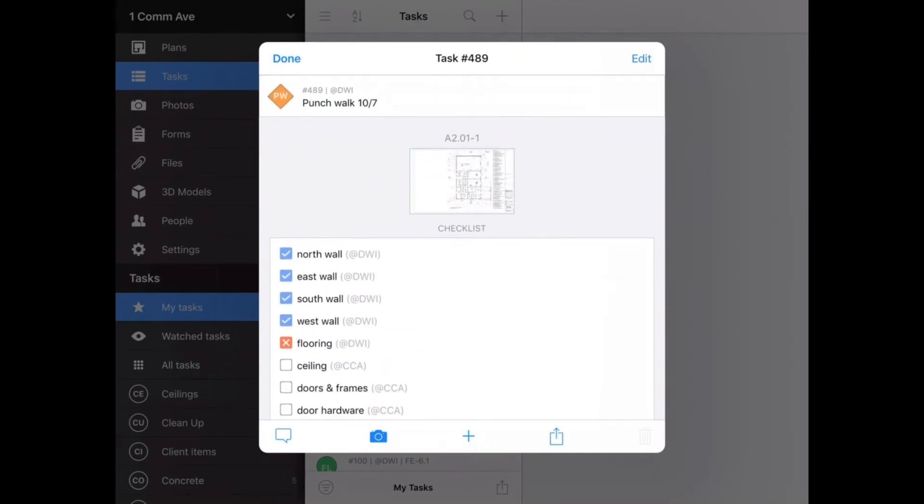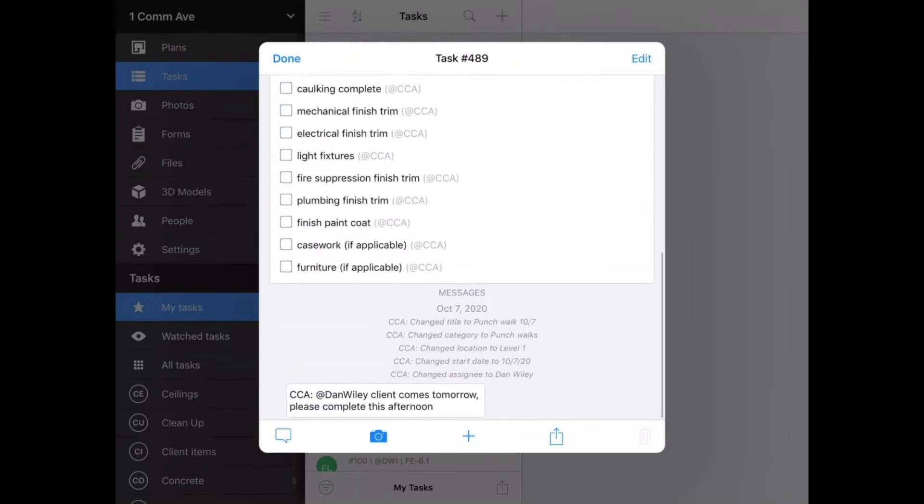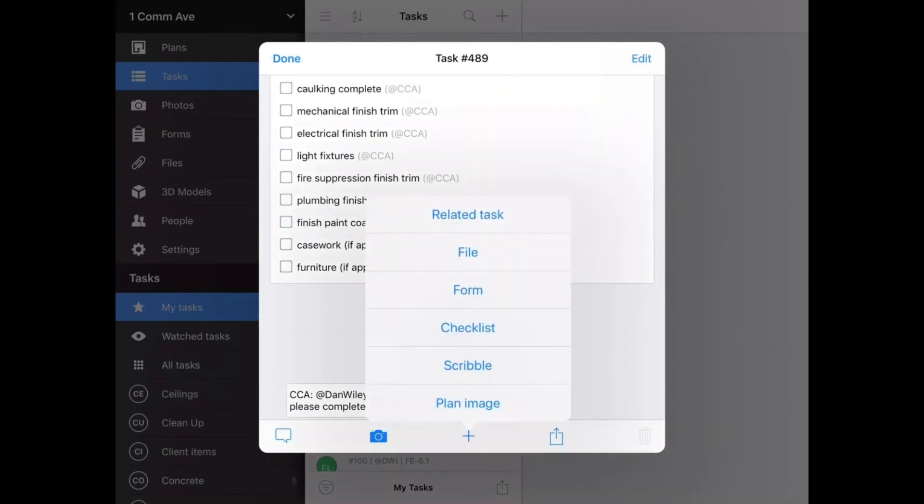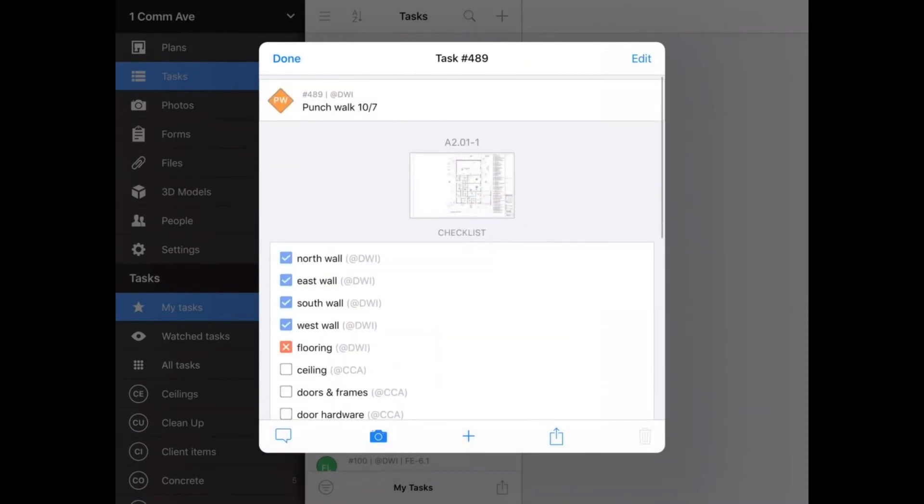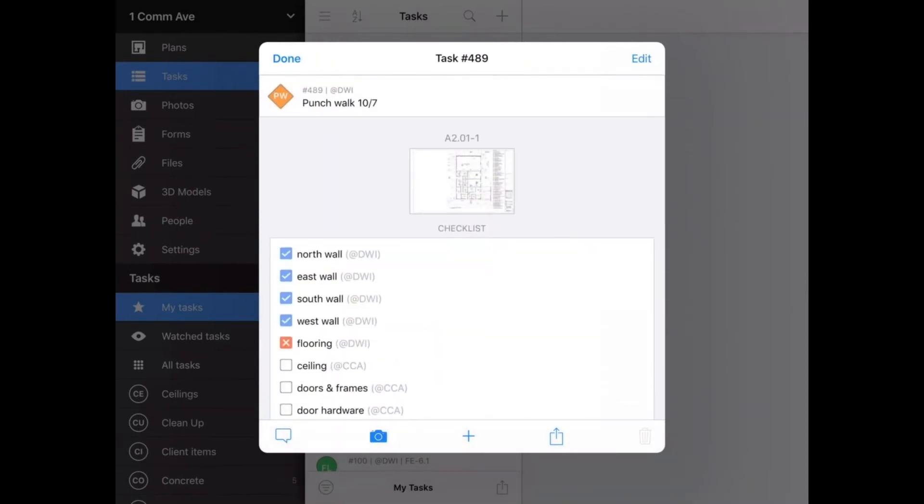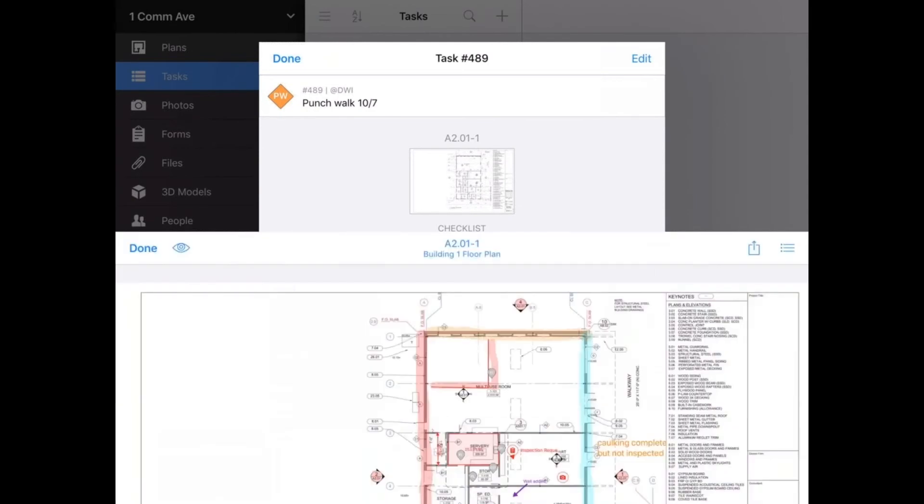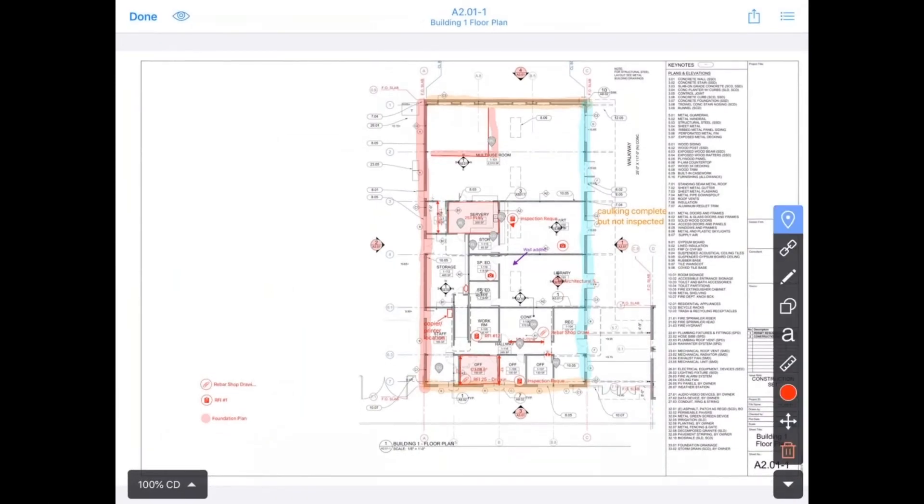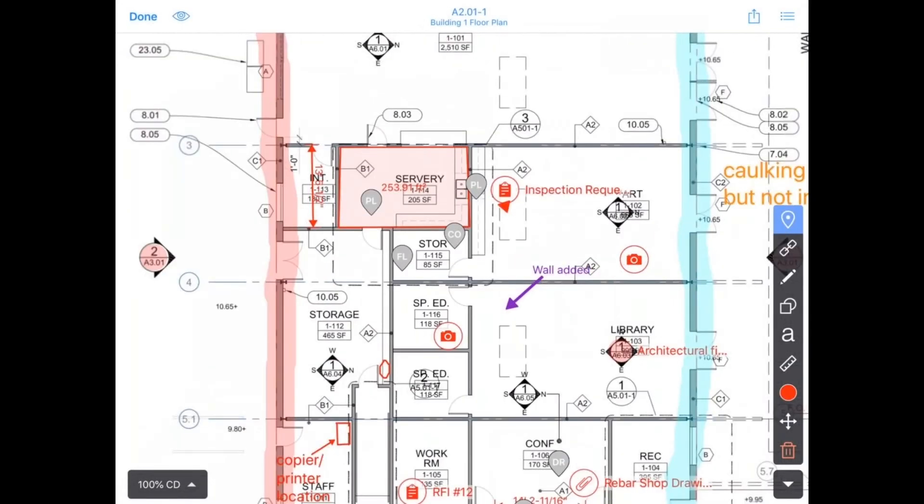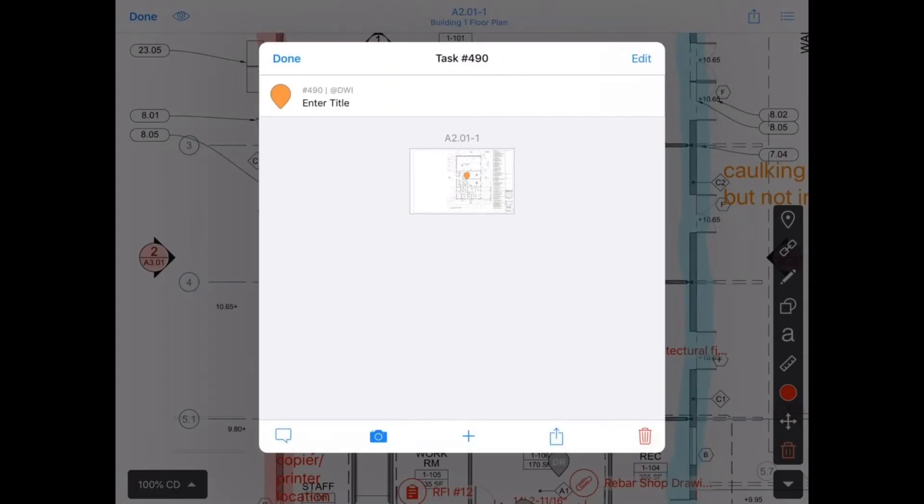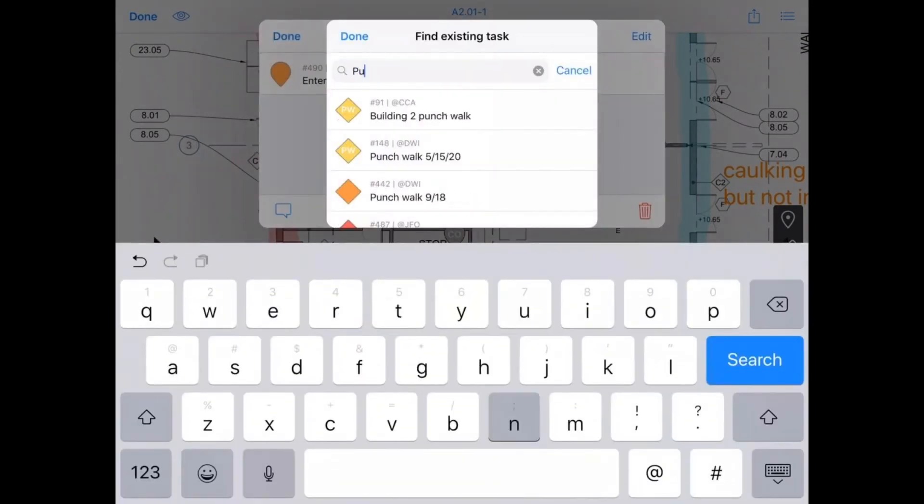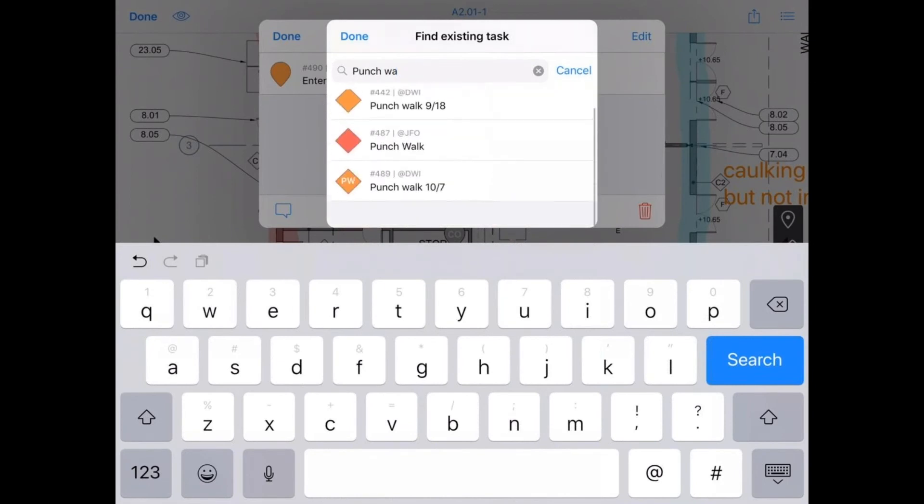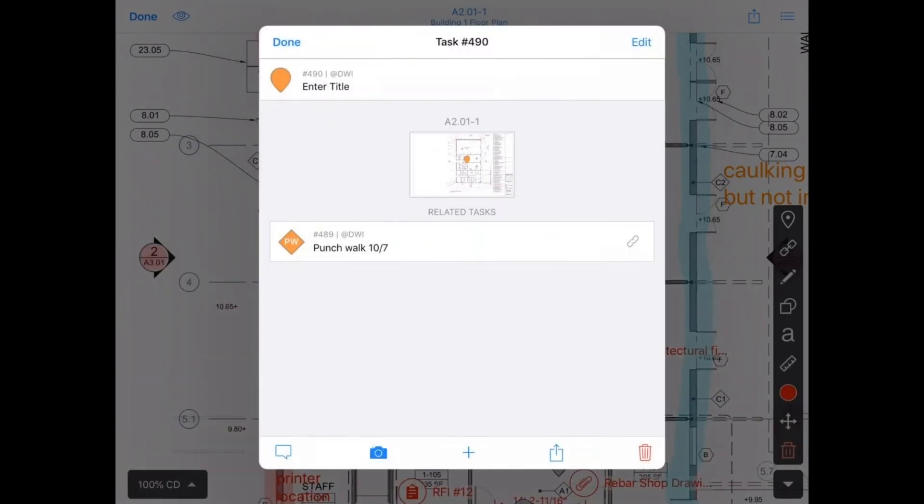We want to track the items that come out of this punch walk as individual tasks rather than adding within the punch walk task itself. So rather than adding a photo of the damaged carpet tile within this task, Dan will create a related task, adding the plus sign and then related task. So we can create a task or find an existing task. Because I want to attach this related task to 2.01-1, I'm going to tap in there and then create the task right on the plan. Then I can relate it back to my punch walk, which I'll search for here. Punch walk 10.7. And now I can jump back and forth between the tasks.